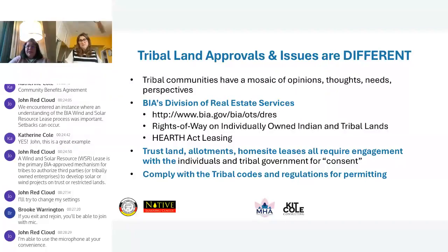As long as you have that roadmap in your engagement strategy and who you need to talk to, sometimes it's at the regional level, sometimes it's at the area office. And those are the nuances where it really does delay, and it could be a week, or sometimes it can be 30 days. And as we all know, developers wonder why it takes the tribe so long to come to a determination of approvals. Well, they don't know that.